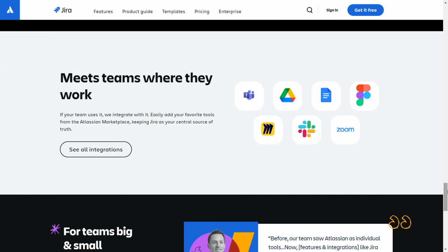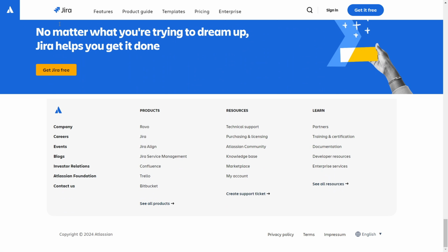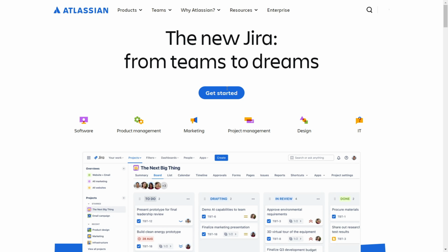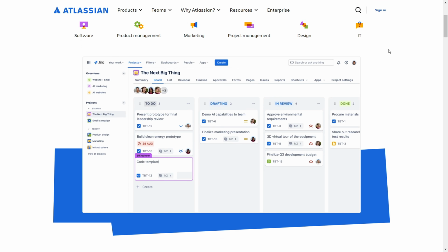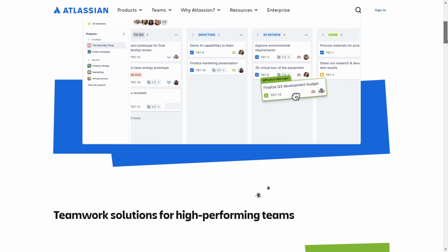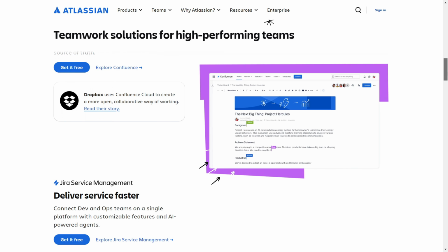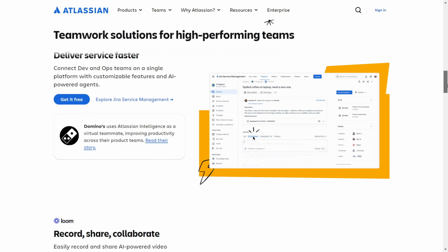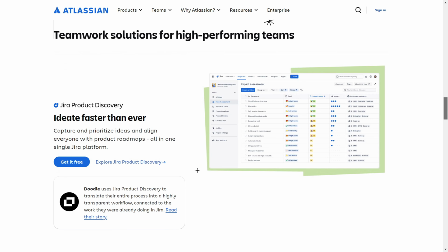You can set up your workspaces, select a project template, define issue types: story, bug, epic, and add custom fields. You can capture and manage requirements, like using the story issue type to describe the requirements in the format. You can create and attach supporting documents, and collaborate with stakeholders to facilitate discussions. You can use the comment section to discuss issues, and you can track progress.